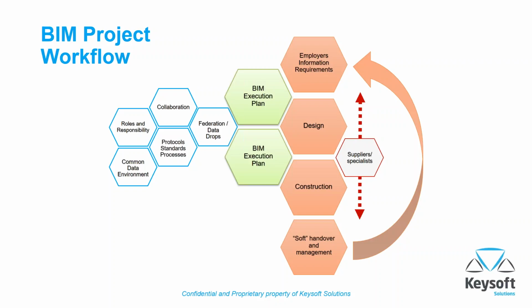So right now, in the current state of the technology, the best bet is for each consultant to use the software that's most efficient for them, and then find a way to build a model based on those. They could be different tools, but the key here is interchange formats and putting together a plan and a framework. As your office begins to form a BIM execution plan, it should reflect the needs of your typical client and your typical team of consultants. But as we know, every single project is different, and so every project needs to have a unique BIM execution plan.